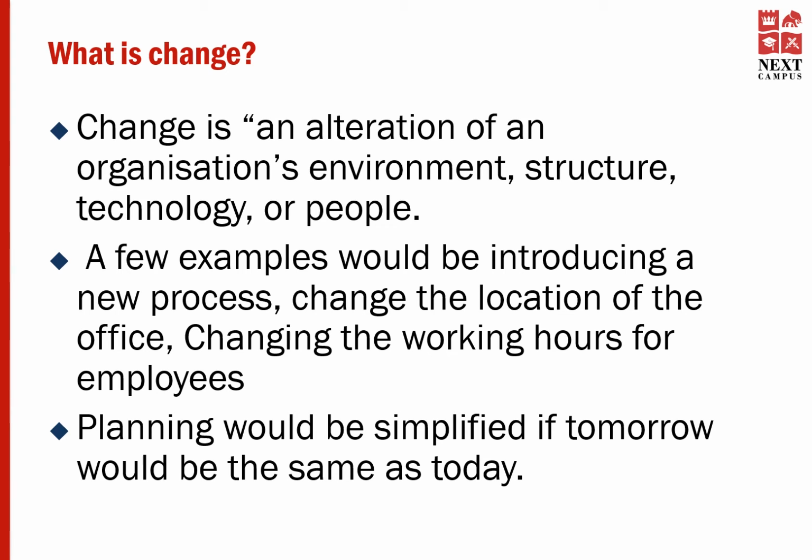The approach traditional management suggests to cope with the changes is through change requests. However, we put a lot of emphasis on finalizing the requirements before we proceed. Sealing the requirements, as we go on with the development, the room for accommodating change is very, very minimal.